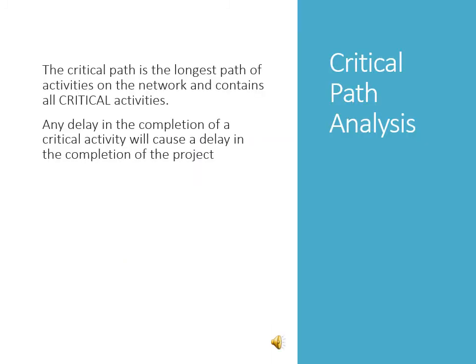It is good to note that the critical path is the longest path of activities on the network and contains all critical activities. Any delay in the completion of a critical activity will cause a delay in the completion of the project.